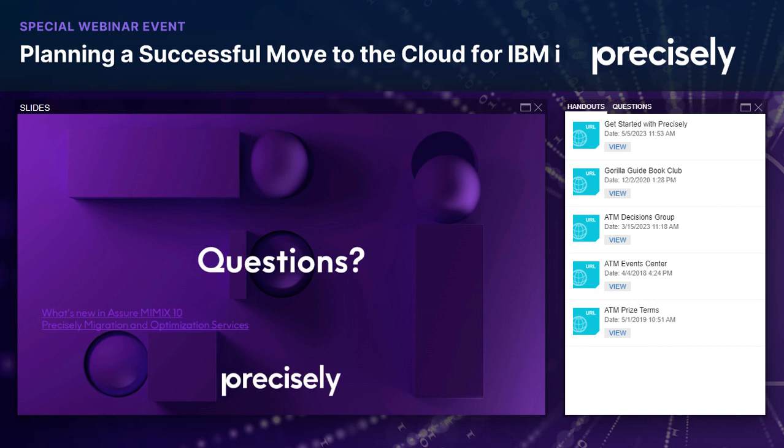Great, and this one's sort of connected. What is the best way to test my application works prior to cutover? Oh wow, again, a great question. You're limited in a tape save and restore environment because you're doing it all at once, so there's not a lot that you can do ahead of time. With a logical replication solution, i.e., migrate while active, that new system that you're going to be migrating to is live and active and is being replicated to.